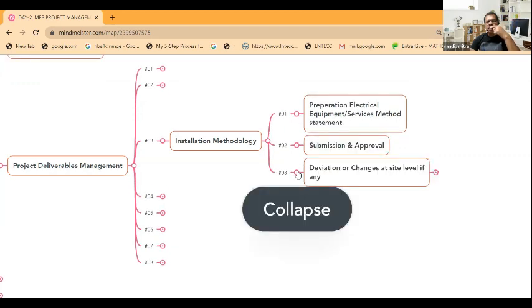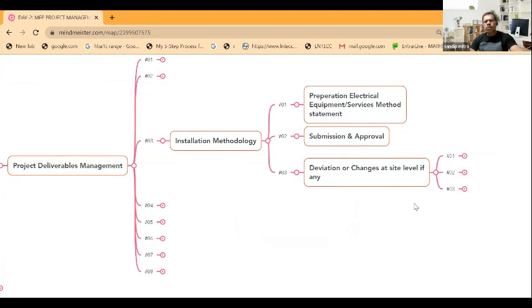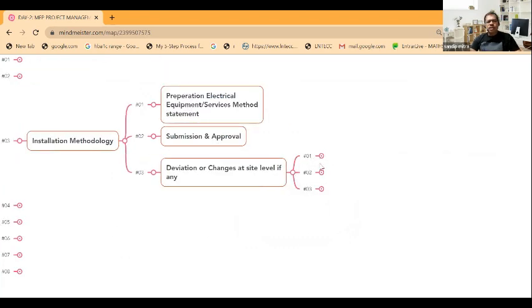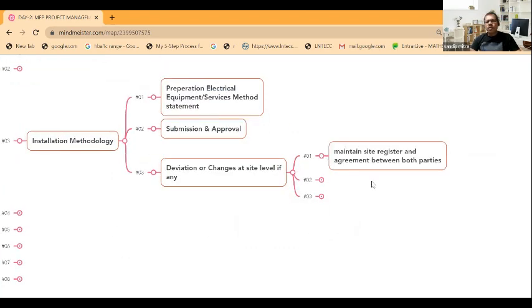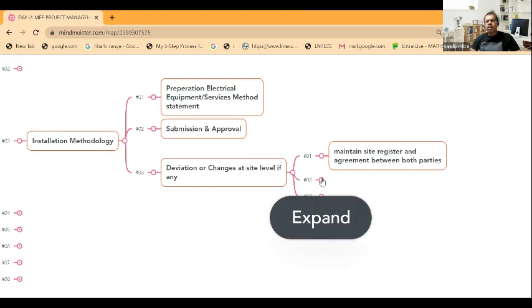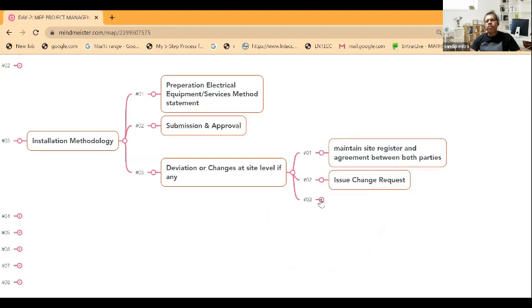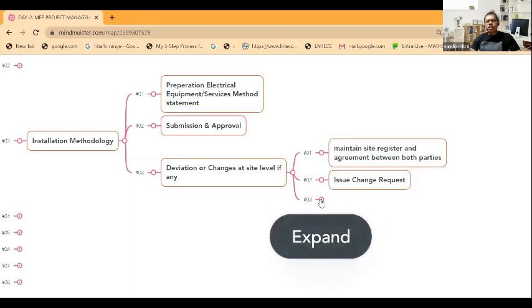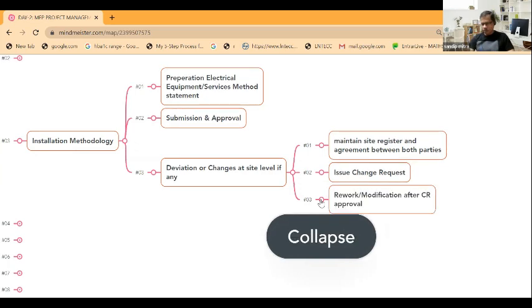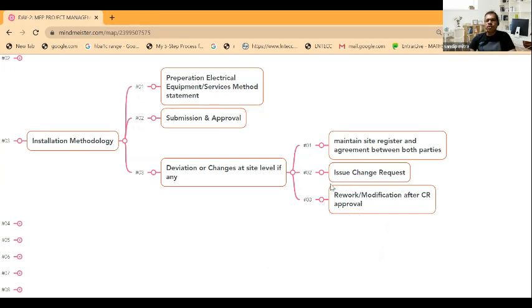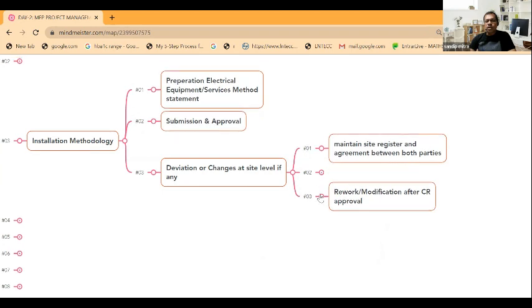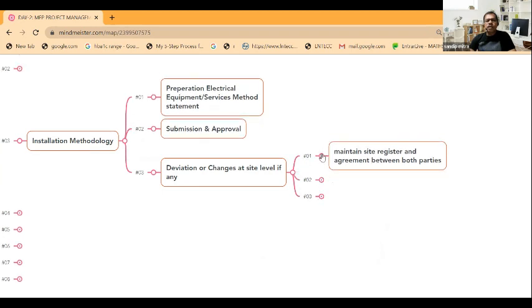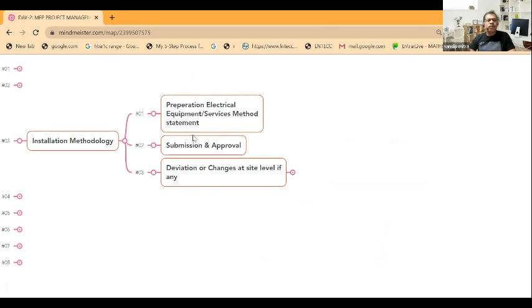If there is any deviation or changes at site level, then they need to be captured. Normally at the site level, there will be a site register that has to be maintained. All the changes have to be written down and noted there, and it has to be agreed between both parties. There will be a sign-off, then issue the change request formally through the contact department to the client. After getting the approval, they have to do modifications or rework based on the change request approval. This is the process you need to follow from the installation point of view.